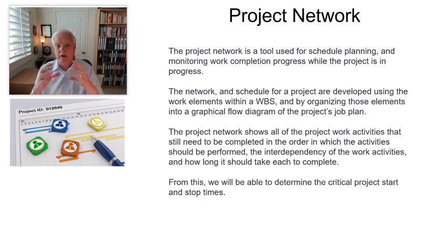Whatever that work activity is at that point in time is going to be something that as a project manager, you need to watch as closely as possible, because what happens almost always is that there's some level of conflict anytime these two network pieces come together into that next one. Both of these must happen for this to start or for this to happen. And if one of these elements structurally cannot happen on time, it stops the entire flow.